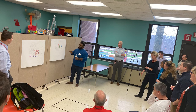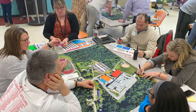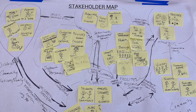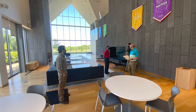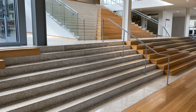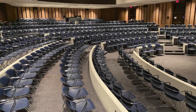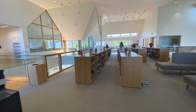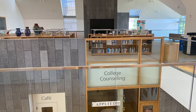The school design action team met during several all-day workshops to unpack our facilities' strengths and weaknesses and identify priorities that needed to be addressed in a future construction and renovation project. Members of the team also made visits to other schools to gather ideas that align with our guiding principles. IKM was hired in February of 2021 as the official architect for the project and took the input from the school design action team to create the schematic design for a construction and renovation project at the middle school/high school building. I'll now turn it over to Matt Hanson from IKM, keeping in mind that this design is still preliminary and changes may occur.